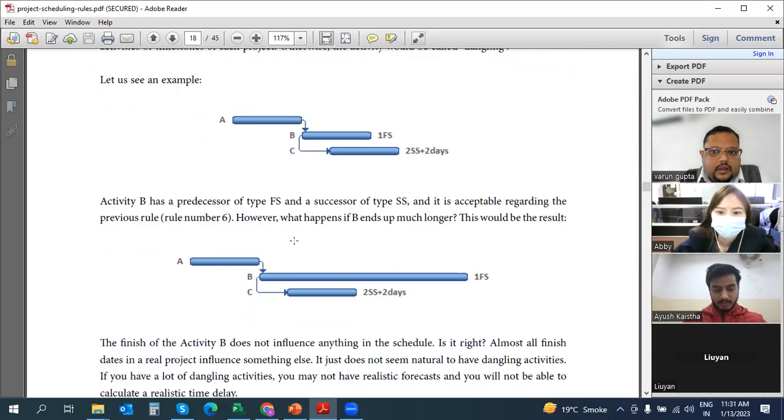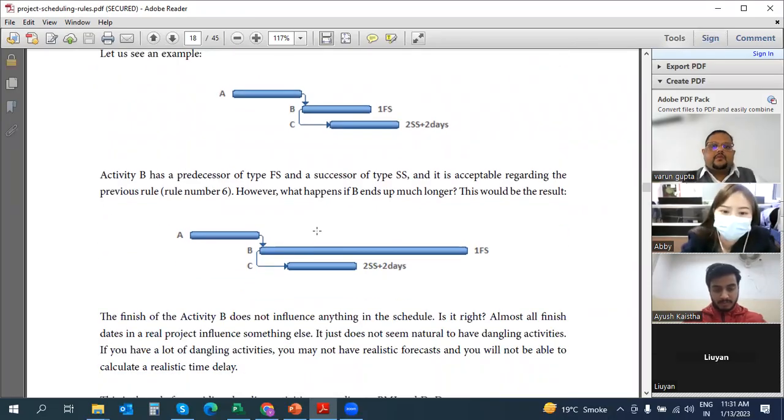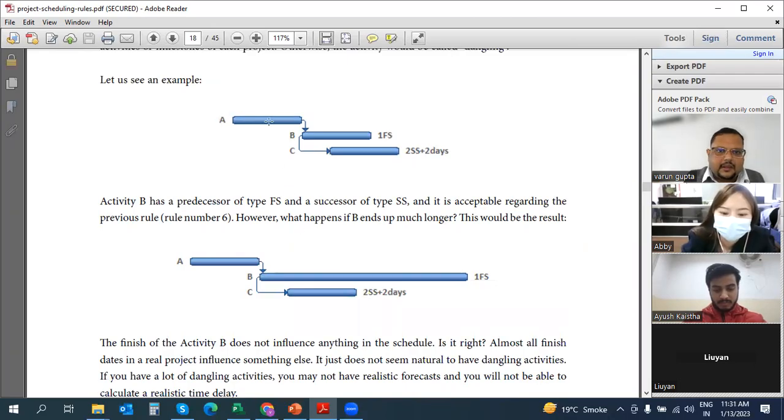Now, let us say this is my earthwork, and this is my PCC, and this is my reinforcement. Now we are very much aware in construction what happens. Just as an example, first the earthwork happens. You will first dig your land, then you will put the PCC, pre-stressed cement concrete for that. Then on that you will put the reinforcement cage. So all these 1, 2 and 3 should happen one after the other, or they can happen in little sequence also. Like C is having the reinforcement cage, that can happen 2 days after B.